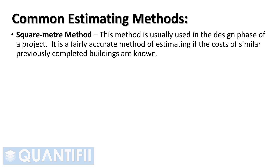Square meter method. This method is usually used in the design phase of a project. It is a fairly accurate method of estimating if the costs of similar previously completed buildings are known.